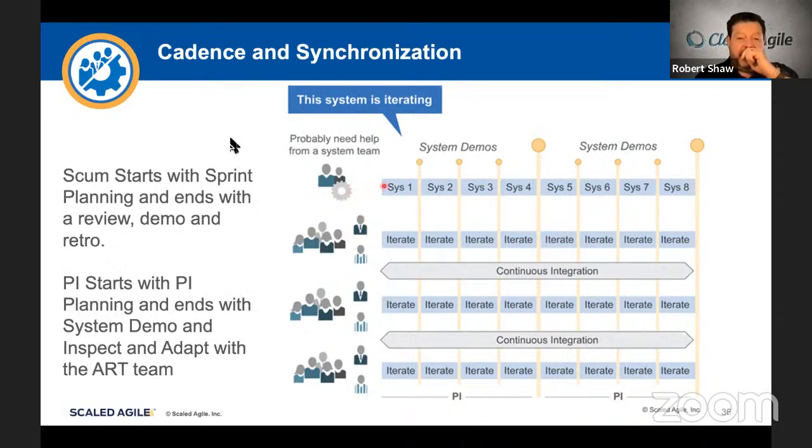But if you look here, I'm going to put these yellow markers. If you see these yellow markers up here, these are synchronization points. This big yellow one represents a big planning synchronization point called the PI planning event, and we see that marked out here at the bottom. Then we have these little synchronization points that are also in here. There's more, but what you start to see is an organized heartbeat that tends to happen, something the entire organization can sync to.